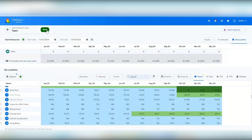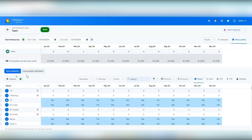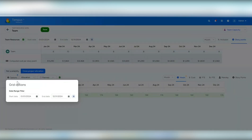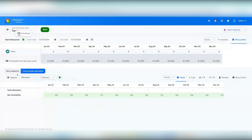Now I'll go ahead and save this. Once saved, you'll notice a new option called cross project allocation, which is very similar to the one we have for regular resources. If I select it, you won't see anything right now because this resource hasn't been assigned to any projects yet — but once assigned, you'll see the projects and associated data. You can filter with the date range filter, view allocation or demand, and choose planned or actual. Both views are exportable as well.